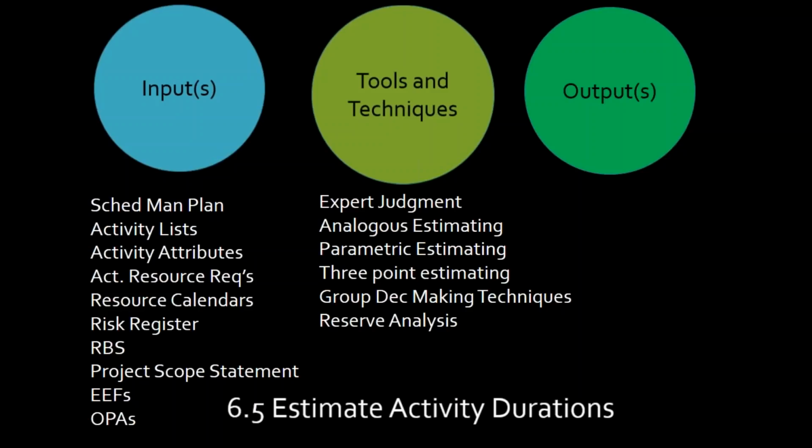But in any case, I do have to do an analysis because we just don't come up with a number off the top of our heads. We analyze and say the reserves for each of the contingencies and the reserves for the management are based on X. But you don't have to do an analysis for the exam, by the way. Just know that that's how you do it. That you come up with contingency reserves for the known unknowns and management reserves for the unknown unknowns. You'll hear that again when we get to risk management.